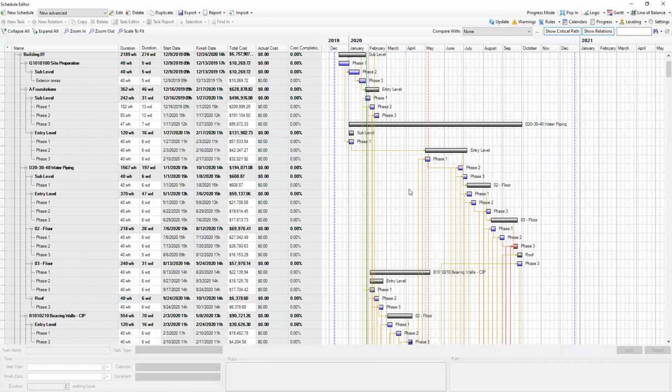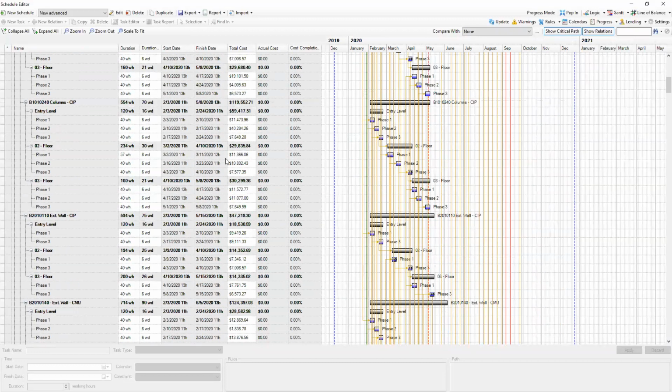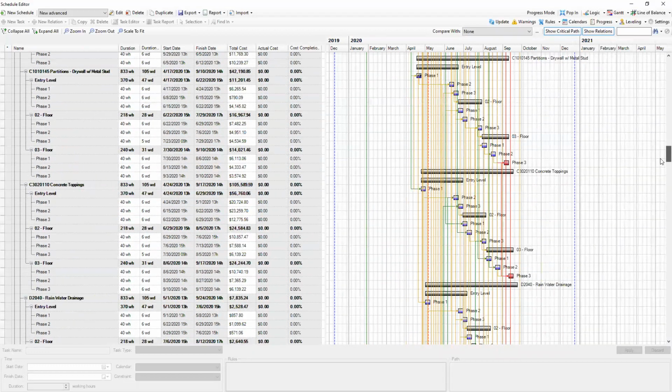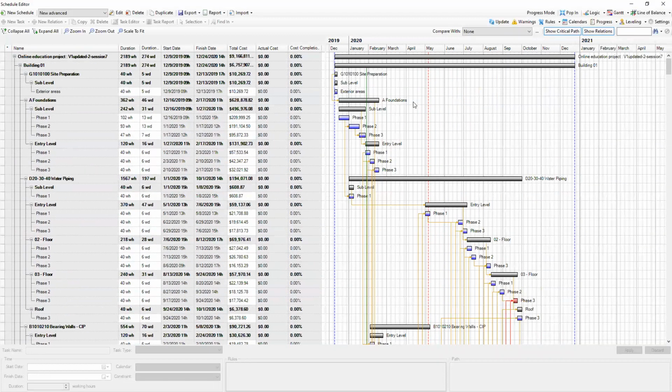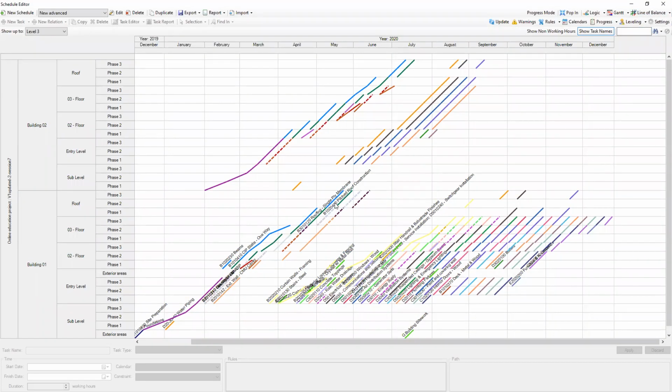And you see some activities, or actually tasks, created links between these tasks, and of course it looks good. I mean, based on just the Gantt chart, you cannot really check and fully understand the quality and the methodology of the schedule itself. So additional help we can get from the line of balance. And this is really good help.